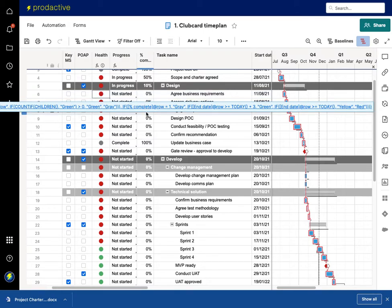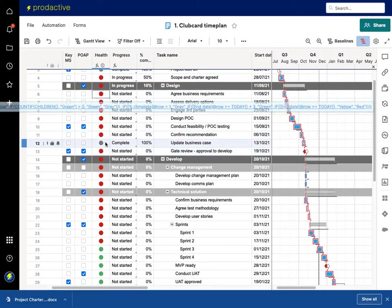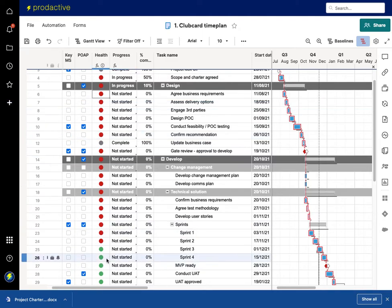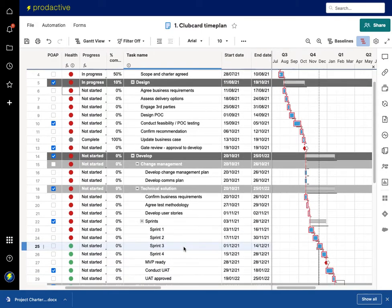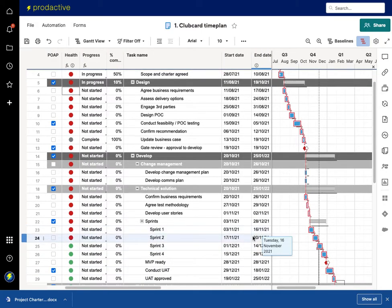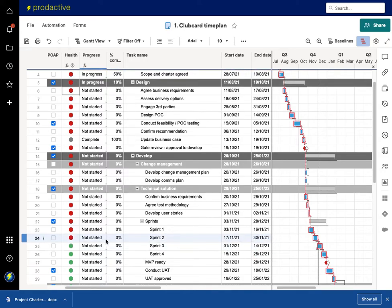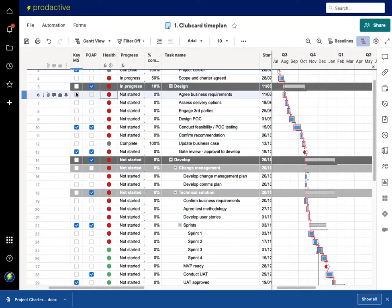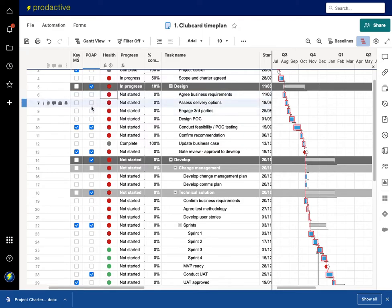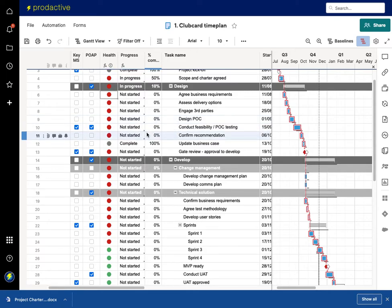This status in this case is worked out by formula looking at the information in terms of what's the percentage complete and is it overdue or not. If it's overdue it marks it as red, it's green if it's on track in terms of where it is expected to be. As we come further down, tasks lower down which are still in play are showing as green, whereas anything that is now overdue is late. I've got a column which enables me to set what's a key milestone. That enables it to appear on my sheet for the reporting and the plan on the page.